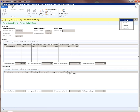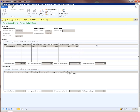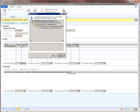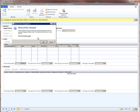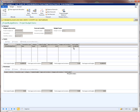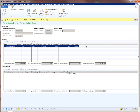So let's go ahead and approve this project budget. Workflow is processing the message in the background, and once that is done, the budget has been committed. Now when we refresh the screen, we see the total budget being $10,000. We have budgeted for item transactions for category spare for $10,000.